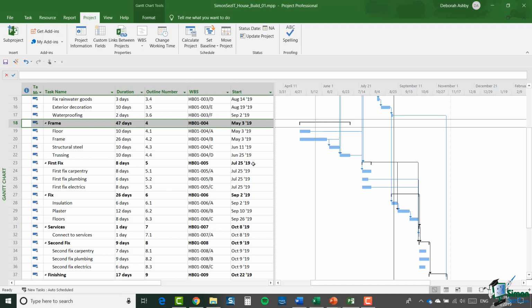But if you have that option, then the renumber either of the whole project or of selected tasks can often give you a usable set of WBS codes again as well. However, going back to the point that I've made a couple of times already, sometimes you just need codes that are fixed. And in this case, you need to use codes that Project 2019 doesn't set. You need to use codes that you set and that Project 2019 leaves alone. And for that, we need to use outline codes, and that's what we're going to cover in the next section.